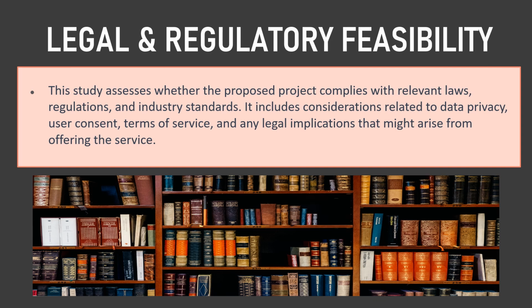What is legal and regulatory feasibility? This aspect assesses whether the proposed project complies with the relevant laws, regulations, and industry standards. It includes considerations related to data privacy, user content, terms of service, and any legal implications that might arise from offering the service. In our example, the team worked with the legal experts to ensure that the app's data collection and handling complied with the data protection laws. They also ensured that the terms of service and user agreements were clearly defined and enforced.